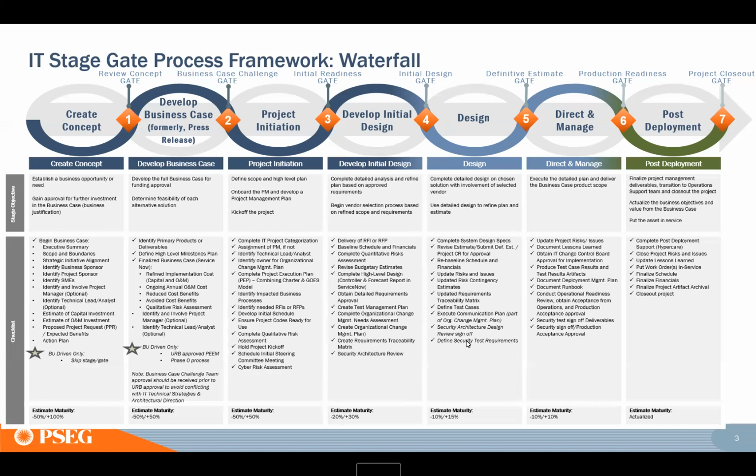Now they may review the information you're providing here and ask for more stuff, ask you to do more things than you originally had in your plan. And then it's a PCR, right? Like it's a change request. It's already happening on several projects.